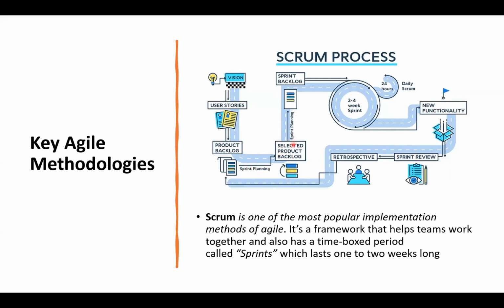Then you select all the different things you want to do for that time. It could be 2 weeks, could be 3 weeks, could be 4 weeks. You now select all that you are going to do. Here you might have up to 20 stuffs you would do, 30 stuffs you would do. Now you select only 5 or select only 8 that you're going to do. Yeah? So you put all of these ones as what you want to do in this sprint. Then you start the journey.